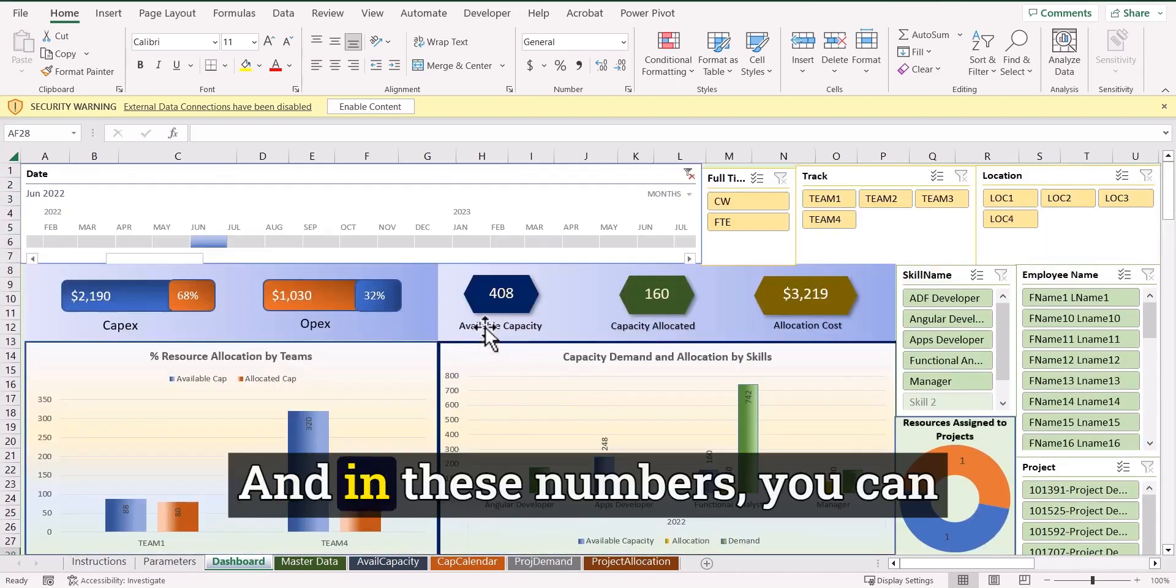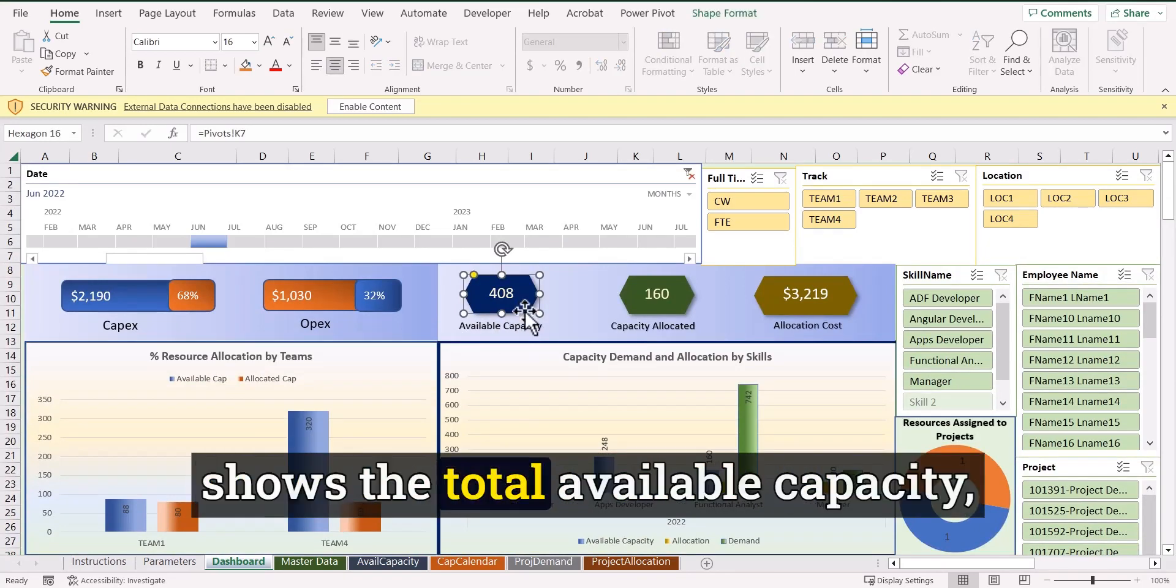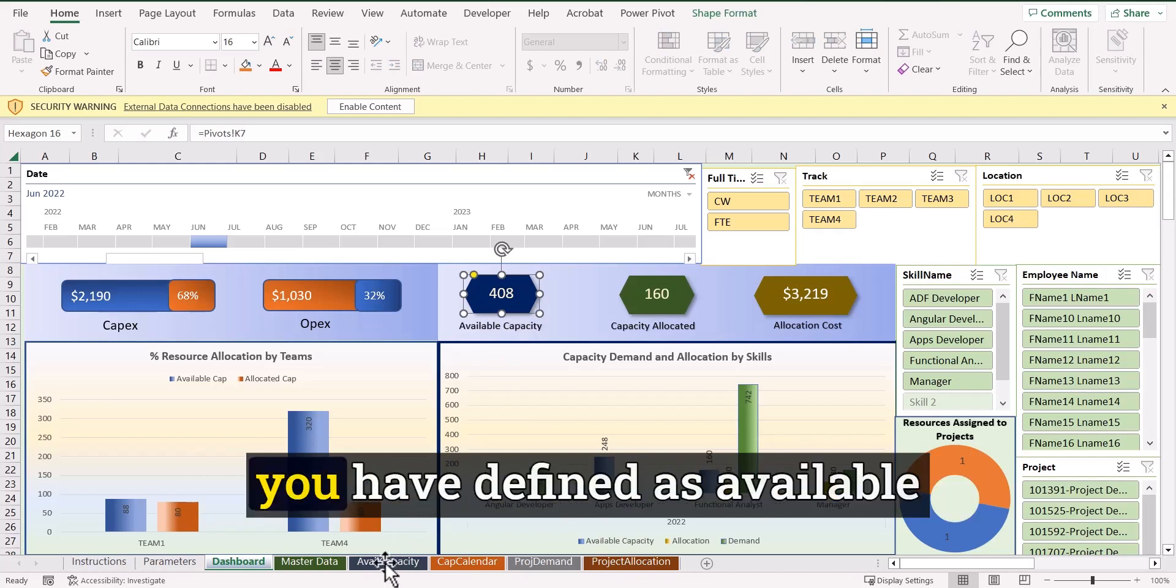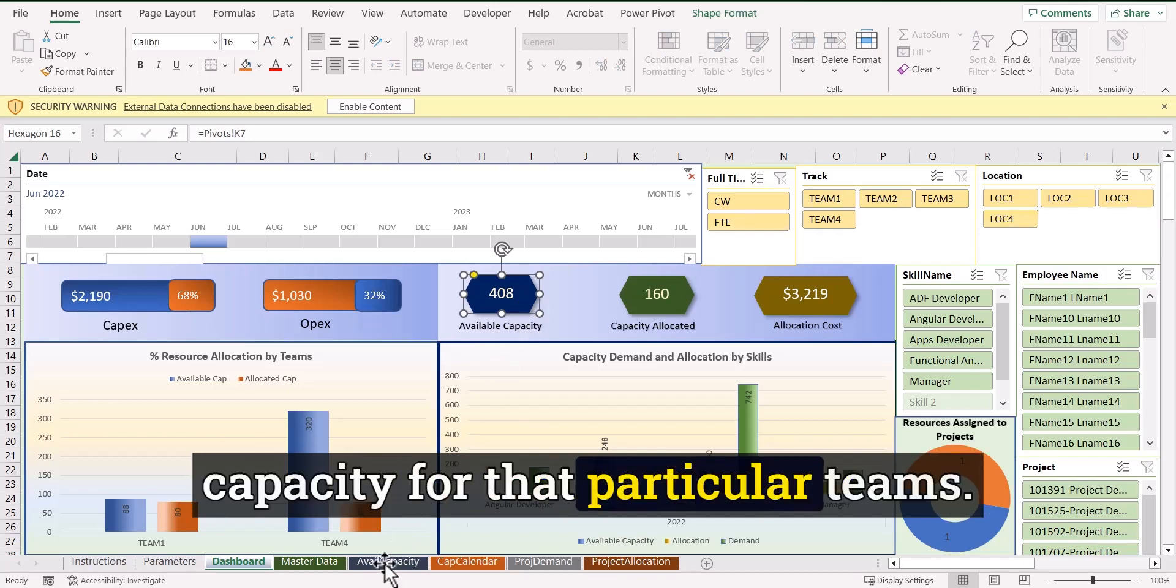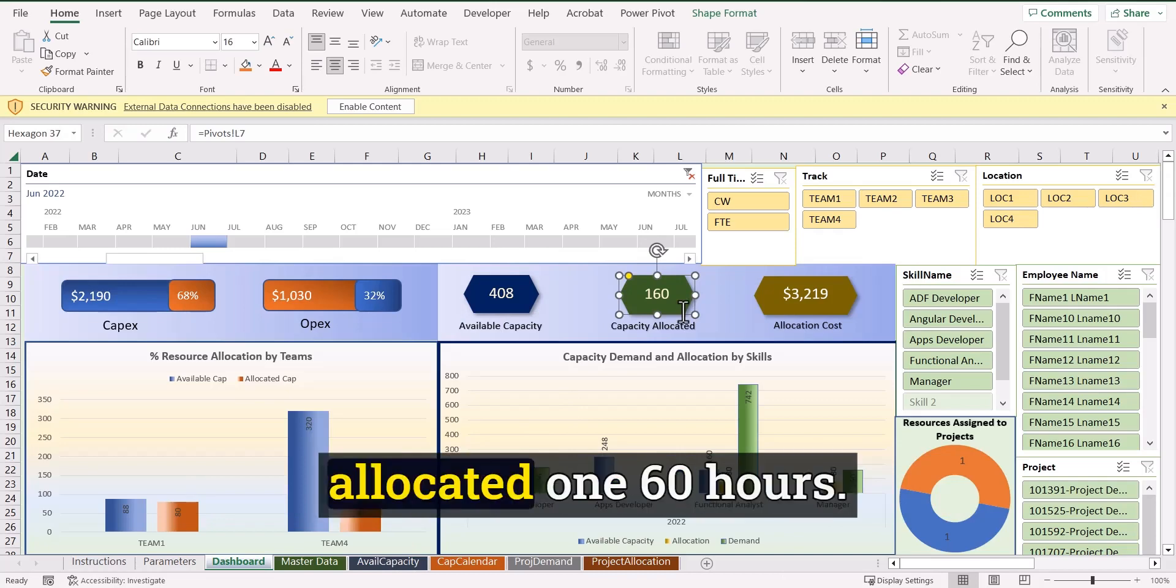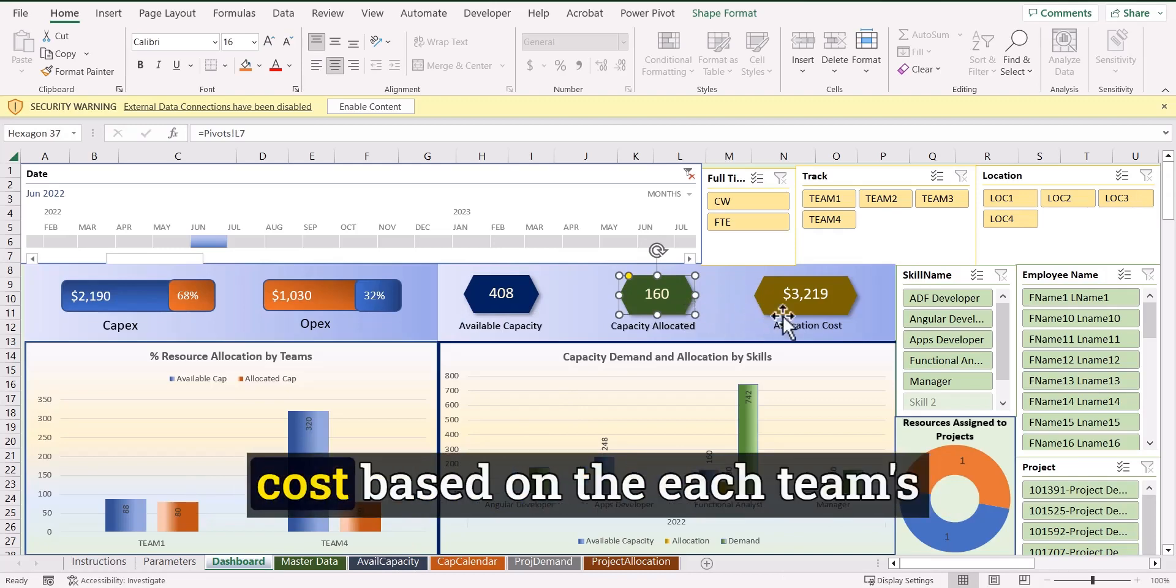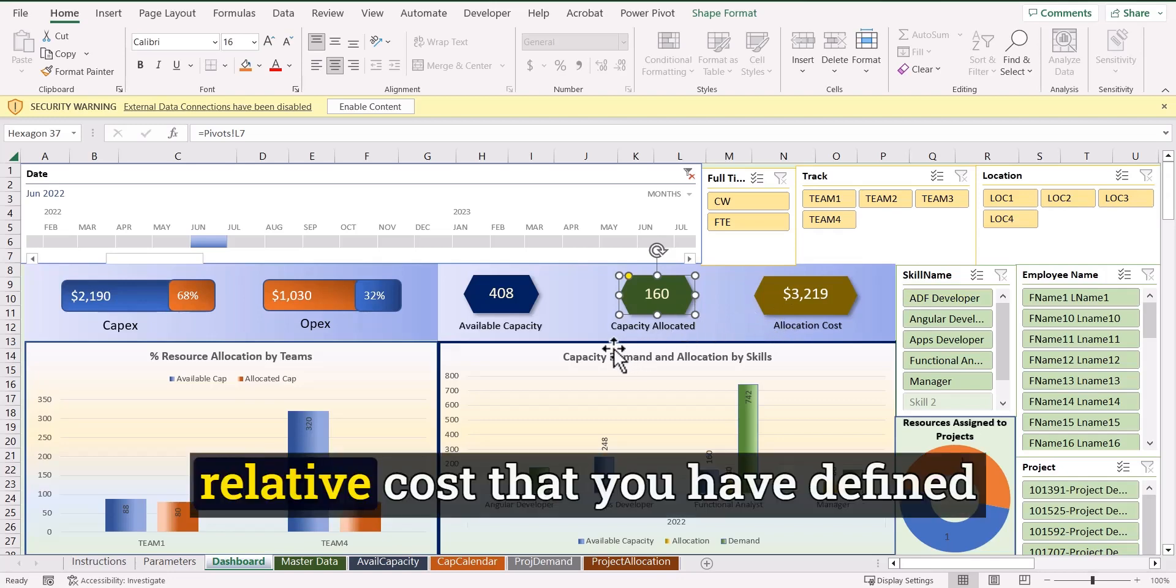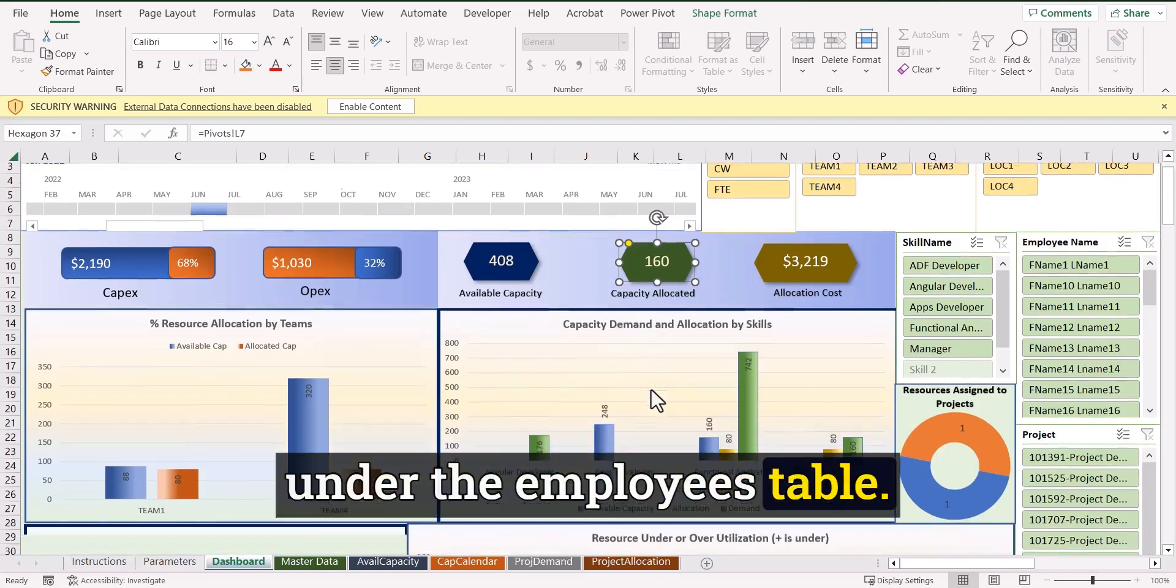And these numbers, you can see that this particular thing shows the total available capacity, depending on how much capacity you have defined as available capacity for that particular teams. And here is the allocative capacity out of 408 hours. Here I have just allocated 160 hours, and this is the total allocation cost based on the each team's relative cost that you have defined under the employees table.